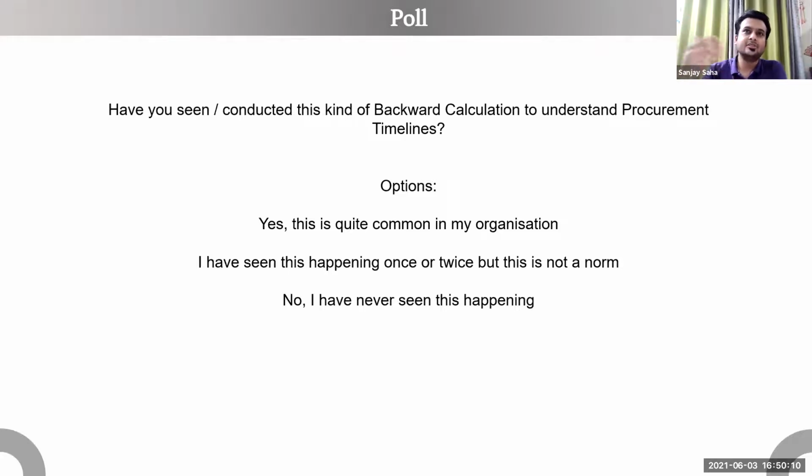More than 5 is good, but it won't really affect the prices. Less than 5, you will probably get higher prices than what is generally in the market when there is good competitive bidding happening. So 5 is the right number of bidders for any product or any procurement cycle. Do remember that. So Gilles, over to you.